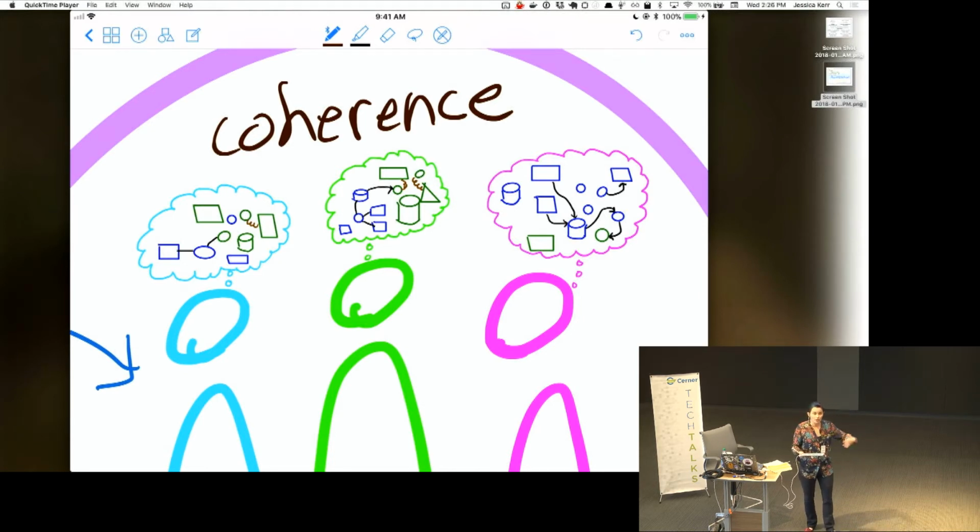So if we want to accelerate, if we want to do things faster, you can't just add people. Eventually, as anyone who's been in software development for 15 years has observed, adding people grinds everything to a halt. Best case, 10 people are doing nothing and 5 people are getting work done. Worst case, 15 people are doing nothing,